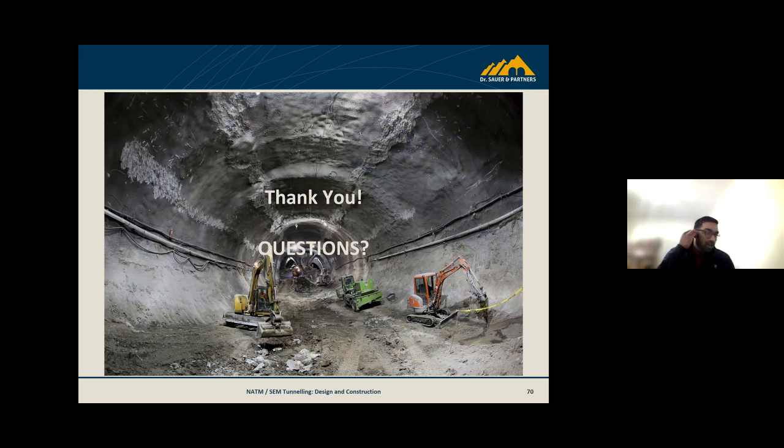I think generally there should always be a senior SEM engineer who holds the RES meeting, who is either part of the design or appointed by the designer's representatives, or by the designer themselves. And I think ultimately the buck stops with them to a degree, just purely because of the interested parties and the angle that they're looking at it from, right?